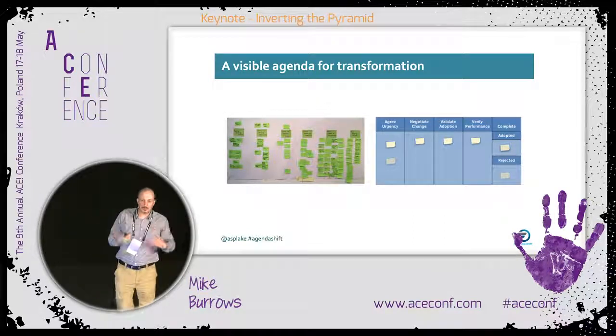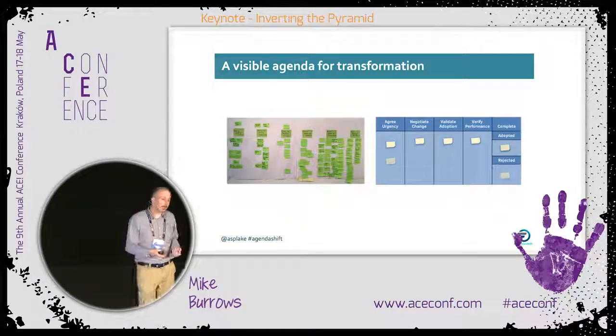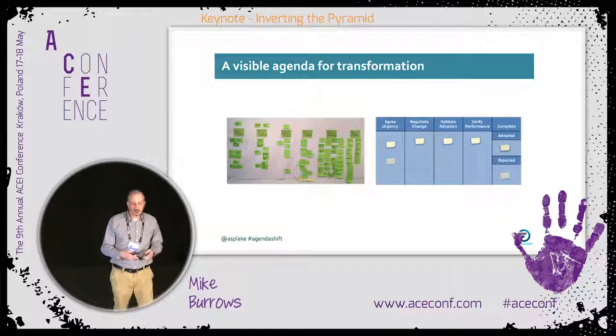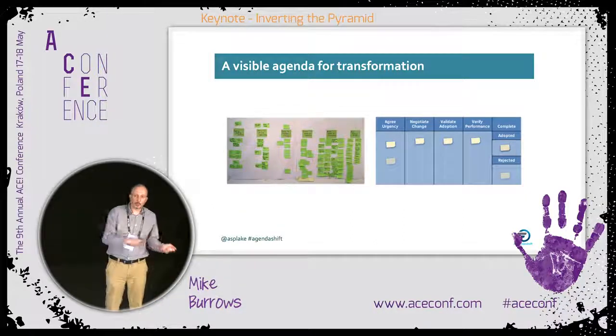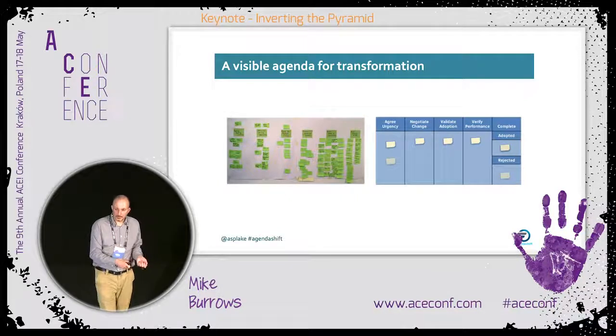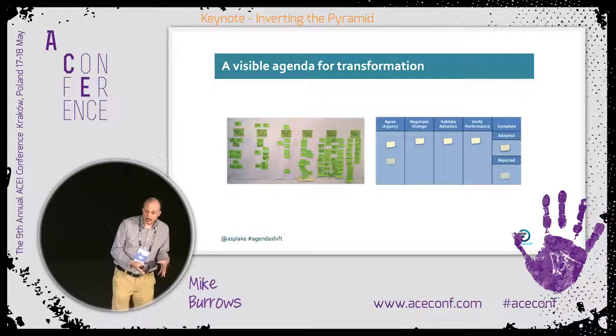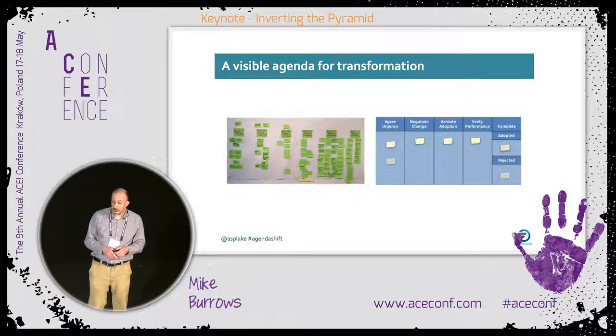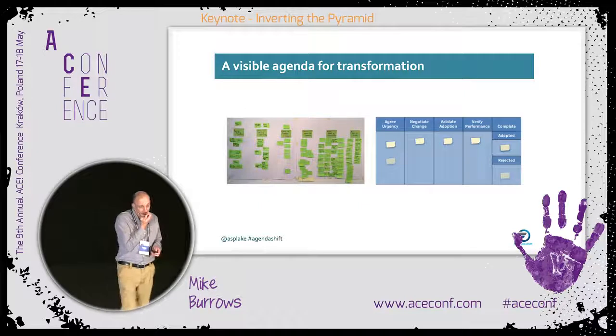Start with the things that you've just learnt. Is the stuff that's just completed going to stay completed? What can we get over the line to complete it? What do we need to unblock or collaborate on in terms of the work that's currently going on? What's the relative urgency of the pieces of work in our pipeline?